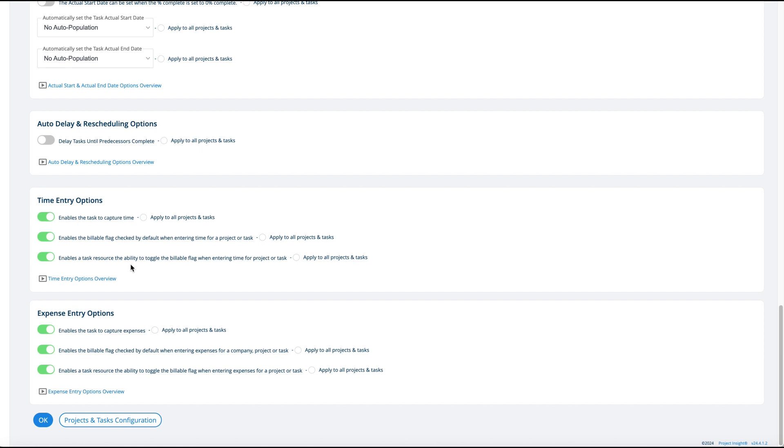If you want the project manager to dictate that these are billable tasks and the person can't turn it off, then that's what this does. And the same exact options for expenses on tasks are here.